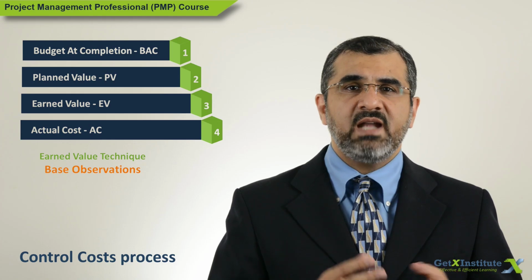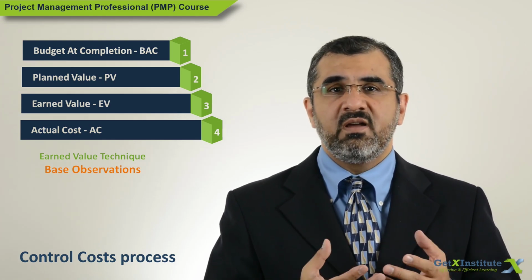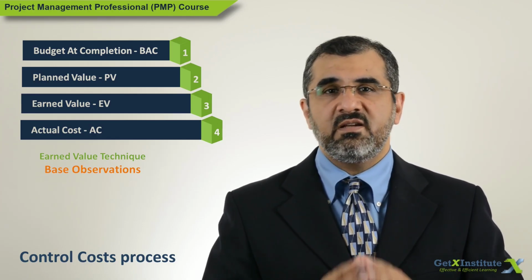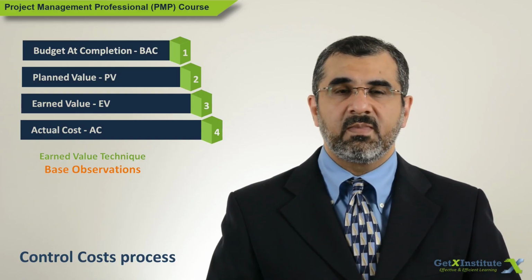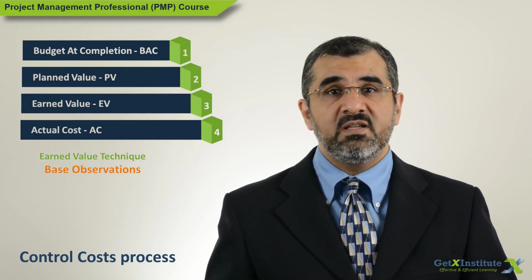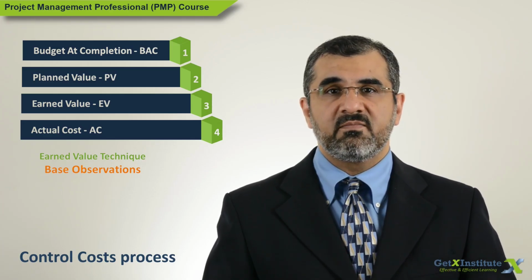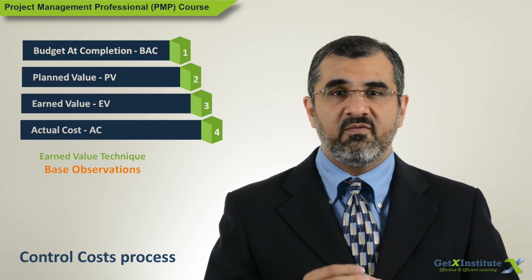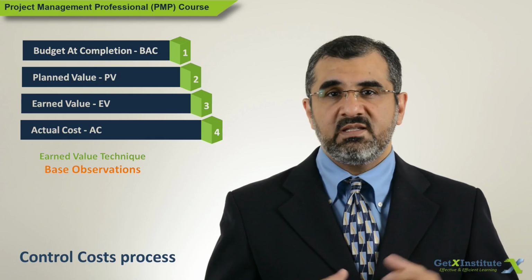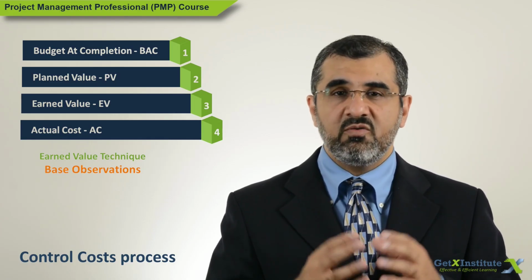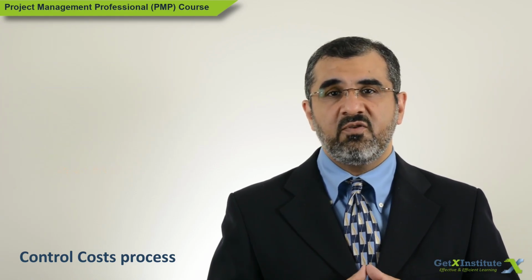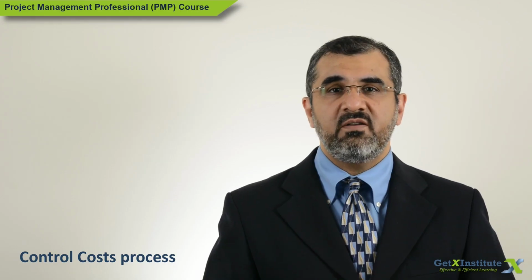Prorate, which is more work done, more cost recorded, or at the start, the whole cost is considered to have been incurred once the work started. Or at the end, the cost is only considered incurred once the work is complete. So different activities and resources may have different ways of recording costs. For the purpose of earned value analysis, the actual cost will be the cost incurred. Since this is the actual money spent or assumed to have been spent, there is no limit to it. So these four are the key factors used for earned value analysis.